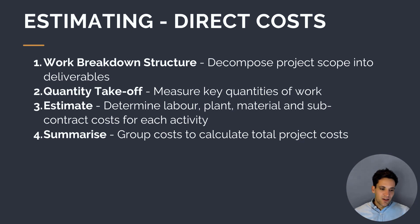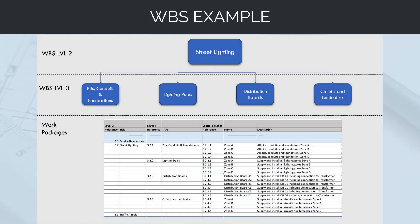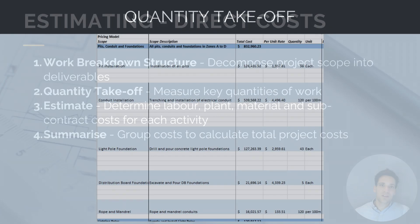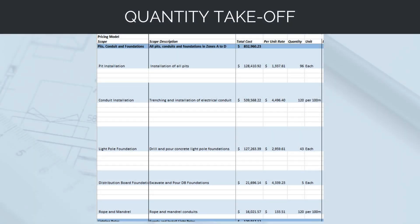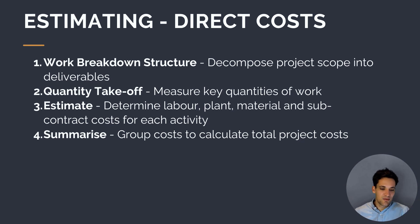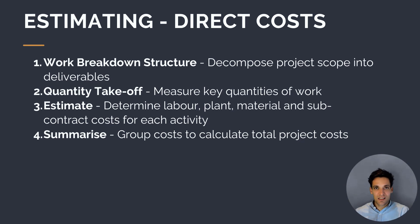The first step in calculating our direct costs is to set up a work breakdown structure — we need to decompose the project scope into component pieces and create a list of every single activity we need to complete. We then complete a quantity takeoff: for each activity, what are the key quantities we need to know? For example, for pouring a concrete foundation, we'll need to know how many square meters of formwork, how much reinforcement, the total volume of concrete, and the area of the slab. Once we've worked out the quantities against each activity, we estimate the cost — determining the plant, labor, materials, and subcontract costs — and combine them all together.